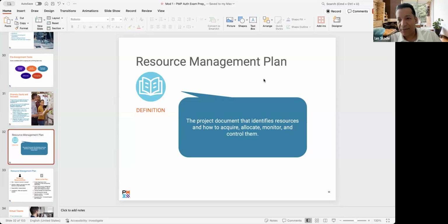And going back to the RACI matrix, if there's a task assigned to you, what letter will that be for everyone that has a task assigned? R. Letter R, right? The person in charge of this retirement party, what letter is that? A. Everyone that we ask about the retiree, what they like, do they like vanilla ice cream or chocolate? What type of flower?